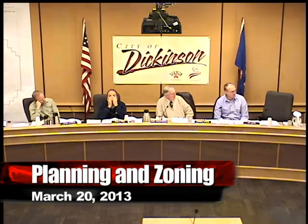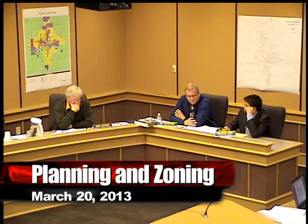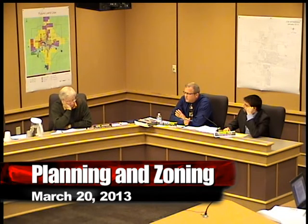Mr. Corton, can I get some comments from you, please? Sure. With respect to the preliminary plat, I've attached 21 conditions. They're broad enough. I think that they addressed enough of it, from my perspective, that if you meet those conditions, then you move forward with a final plat on that. I've already had discussion prior to the meeting with Mr. Bachman, and they are very aware that 90 days is not realistic. 90 days is a more realistic term. 60 is unrealistic. The 21 conditions that are proposed will take time to go through. But with respect to whether I feel comfortable, based upon those conditions for preliminary plat approval, I do.